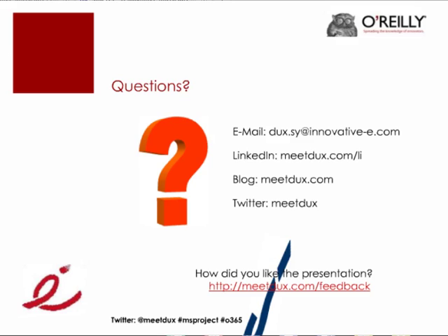I want to follow up on that, though. You can create the complex dependencies in Microsoft Project, but you cannot create complex dependencies in the SharePoint project task list.